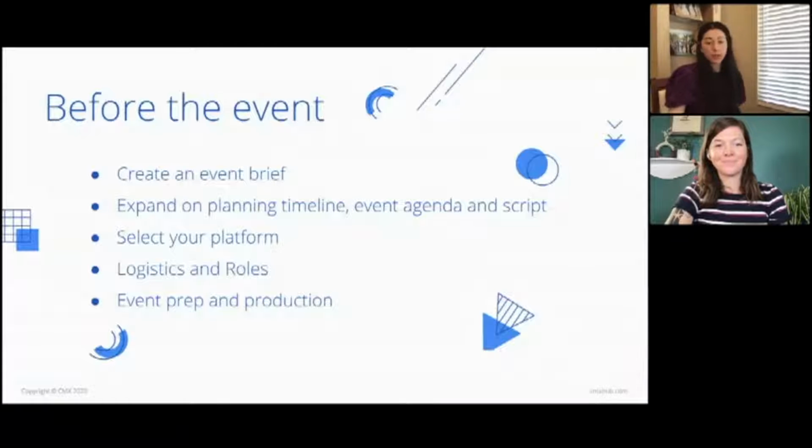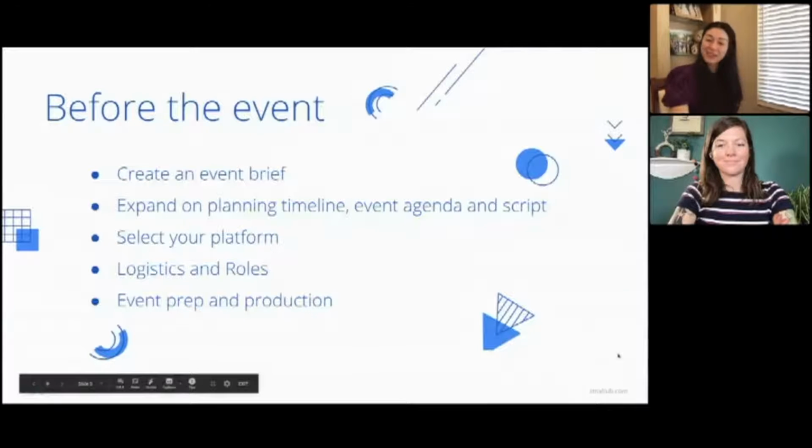And finally, event prep and production. A lot goes into this, but one of the biggest things that we did was host rehearsals for all of our speakers, presenters, volunteers, and MCs. We did that a bit on the later end of things because we were rushed. So next time, definitely make sure they have more than 24 hours to get familiar with the platform. And then you'll be good to go.